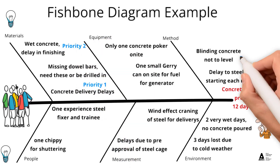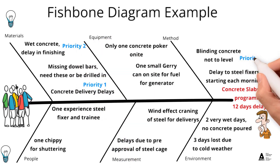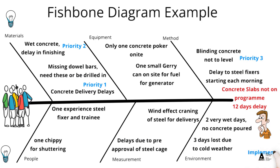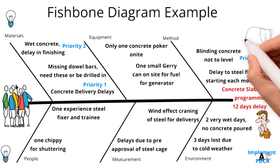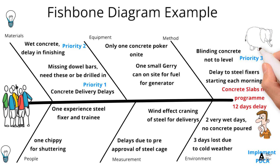It's important that we try to prioritize them, so we rank them one, two, and three. To prioritize, we get agreement from our team on which are the most important ideas, and then we implement a Plan-Do-Check-Act cycle. It's always very important when doing a fishbone diagram that if there's an elephant in the room, it needs to be talked about.